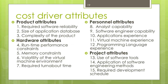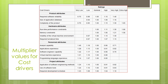The cost driver attributes are grouped into four categories: product attributes, hardware attributes, personal attributes, and project attributes. Each cost driver is rated for a given project environment using the scale: very low, low, nominal, high, very high, and extra high — describing to what extent the cost driver applies to the project being estimated. This table gives the multiplier values for the 15 cost drivers and their ratings as provided by Boehm.